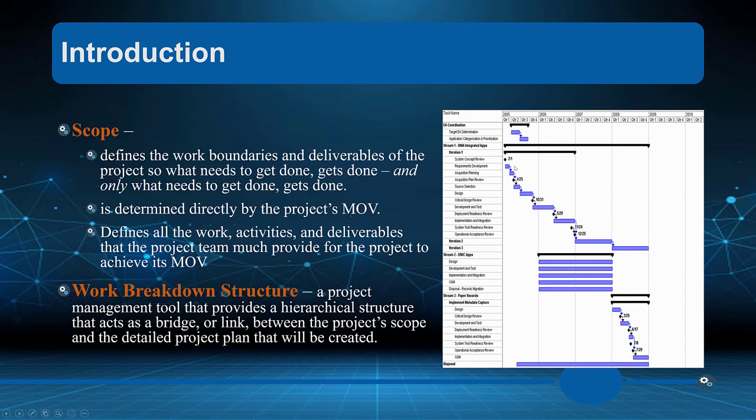I've given you an example of a Gantt chart so we can look at project scope and see that some items need to be done sequentially and some can be done concurrently. We can limit the project timeline by doing as many things concurrently as possible, but certain things must be sequential — for example, buying software licenses and installing products on a cloud or local server before we can move forward.